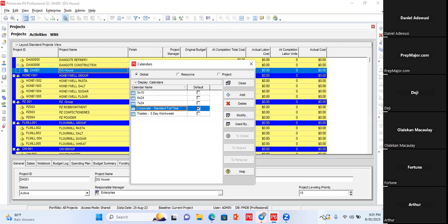I think the project will take 16 days. How? So there are 10 tasks to do. The 10 tasks are expected to take 10 days. Now, for 1 task to finish, it takes 2 people to work on 1 task. So Omolola has only the availability of 4 days in the whole of 10 days because she works 2 days a week.